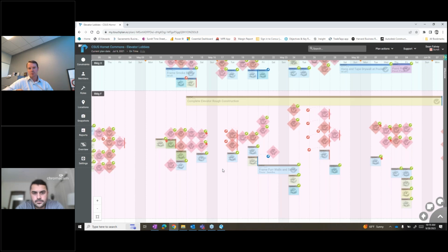We'd be leveraging more of the in-person contact, calling the foreman, hey, what did you get done today? Did you get this done? Did you get this done? Hoping we got everything checked off the list. And we'd be using spreadsheets and our traditional weekly work planning template. But the challenge is that if things slip, then you're updating everything down the line. If something slips on a Monday and you've got a plan out for every day of the week, you've got to make all those updates in that Excel spreadsheet, and it's a pretty laborious task.